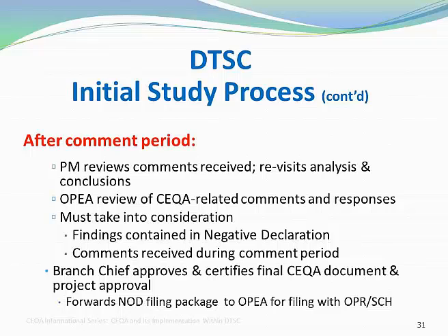Okay, now I'll move on to the response to comments phase and final phases of the initial study process. After the comment period has closed, the project manager reviews the comments received and revisits the initial study analysis to ensure that circumstances haven't changed the conclusions. The project manager sends the CEQA-related comments and responses to OPIA for final approval. And prior to approving, the project manager is required to take into consideration the findings contained in the draft CEQA document and comments received during the comment period.